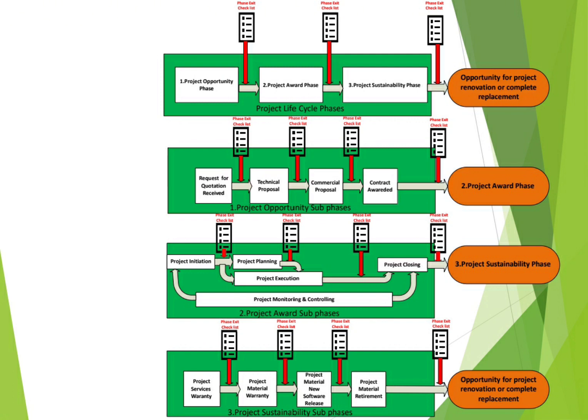All your change requests are approved or finalized. The contractual points related to these change requests, either change orders are in place and the associated invoices are paid. All of this will be the phase exit of the execution, so that you can proceed with the project closing.